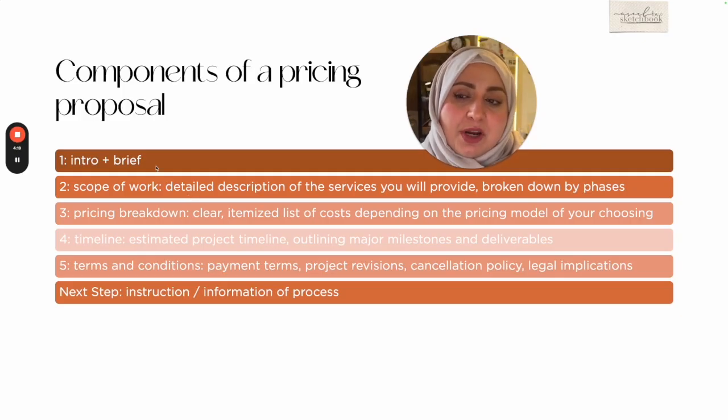The difference between a pricing proposal and a quotation is that a pricing proposal talks about every little detail. So even if you want to, for example, change the door frames and that is a part of your scope, you write it down. If you want to change hardware, you have to write it down. So every single piece of the project needs to be written down in the pricing proposal, where it's also broken down to which phase it is going to go in.